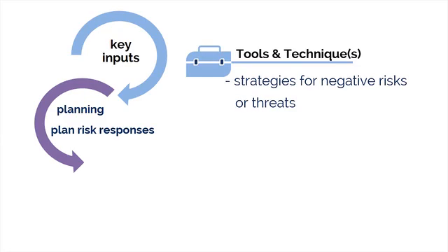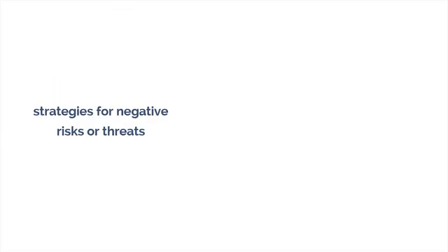If there are negative risks, any of these response strategies can have varied and unique influences on the risk condition. You should choose the strategy that best matches the risk's probability and impact on the project's overall objectives. So the strategies for responding to negative risks are avoid, transfer, mitigate, and accept.